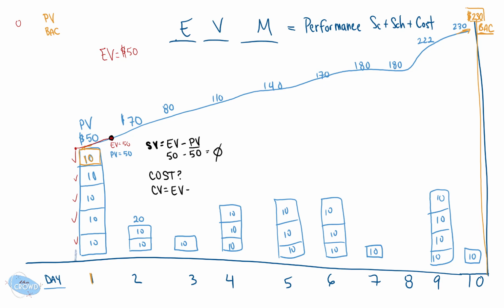And now, at this point, we have to figure out how much it actually cost us to demonstrate actual cost. So the money. How much did it actually cost us to earn the value that we had sought? The actual cost was, in fact, 50. All the labor costs and equipment costs were exactly as we planned. And as you may gather, if our actual cost was 50, and our plan was to spend, what we earned was 50, that would mean there is no cost variance, CV.